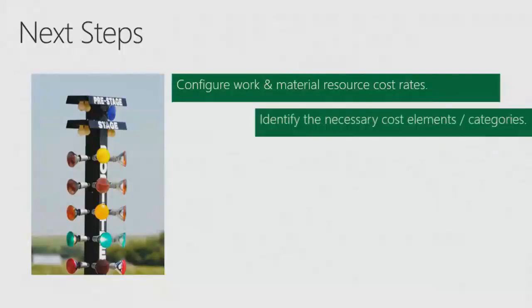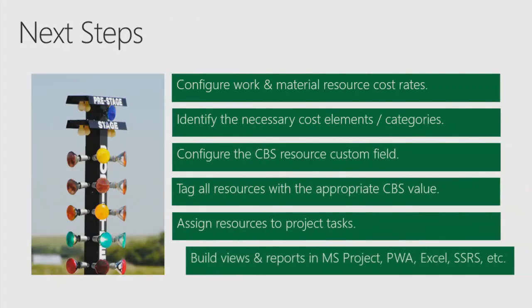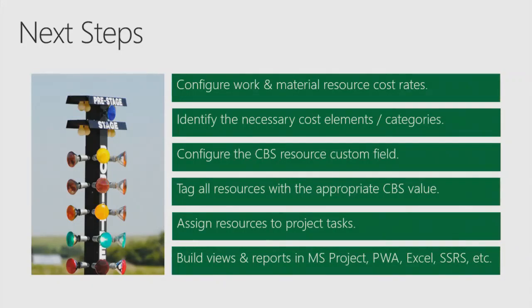Okay? So just a quick recap here. If you want to implement this in your projects, put in your rates. And when it comes to personnel rates, maybe check with finance, see if they can give you a nice blended rate with the overhead costs and all that included, so you can't reverse engineer that very easily to see what somebody makes.